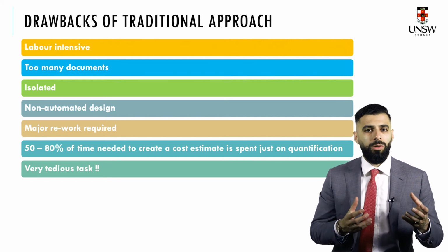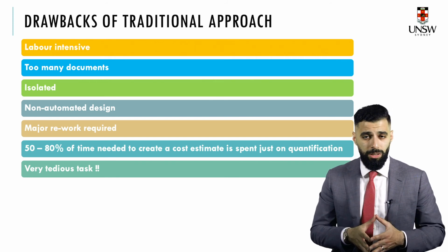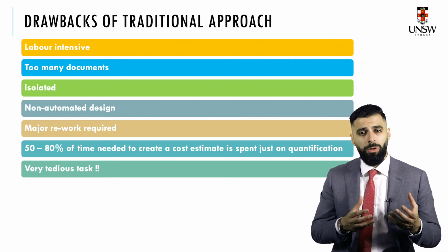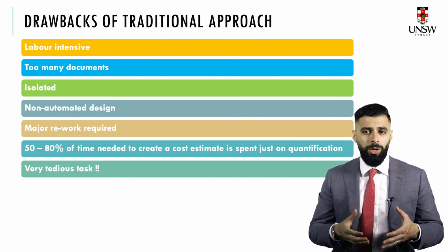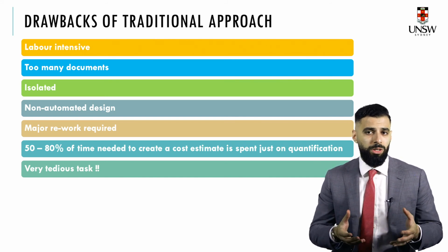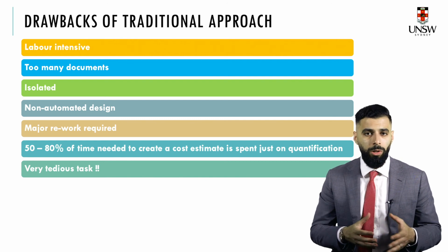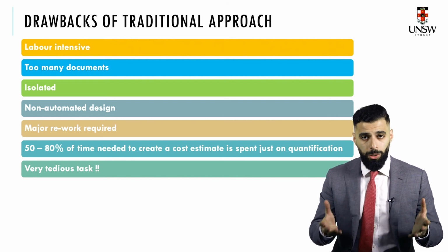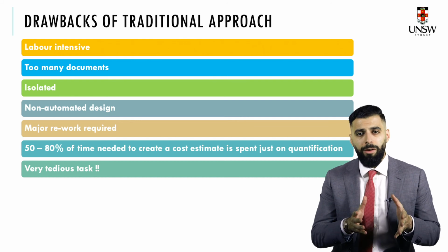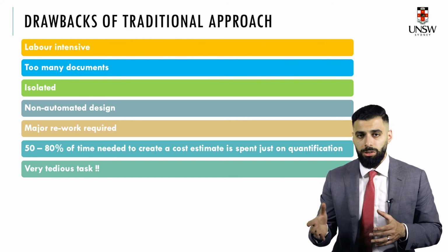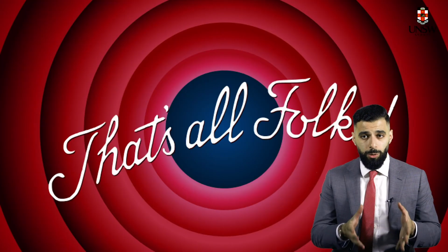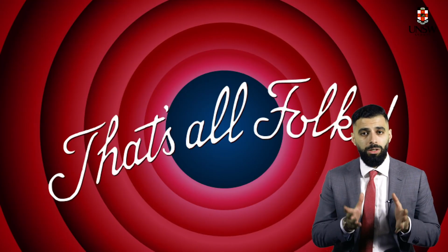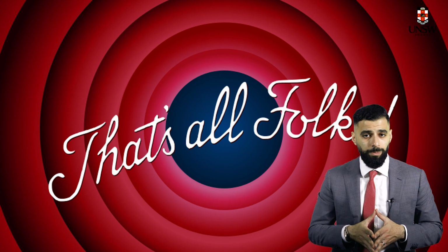Because it relies on manual updates, there is the inability to respond to design variations, and as such requires a lot of rework if the design has to be modified due to, for instance, a clash between your mechanical and electrical elements in a project. Note that on average, to establish a cost estimate, 50 to 80% of the time is actually spent just on the quantification process.